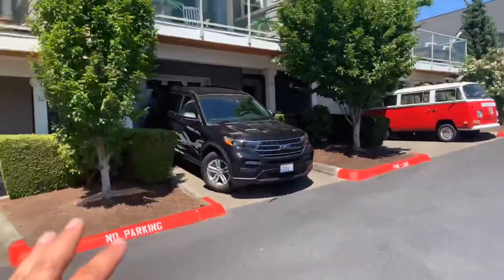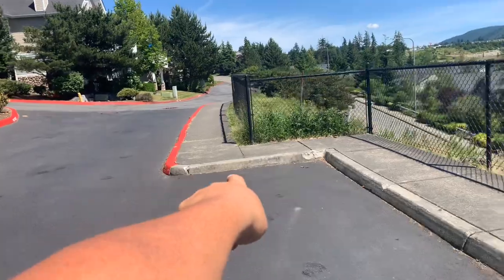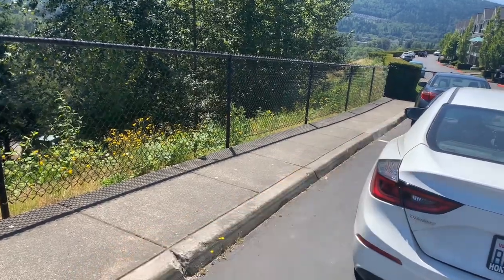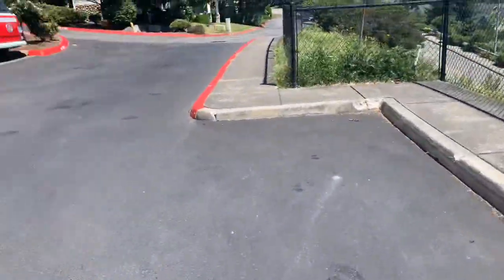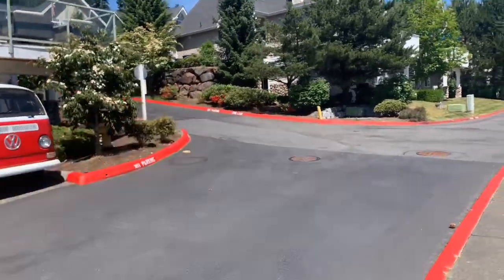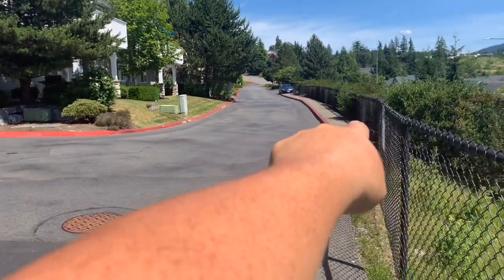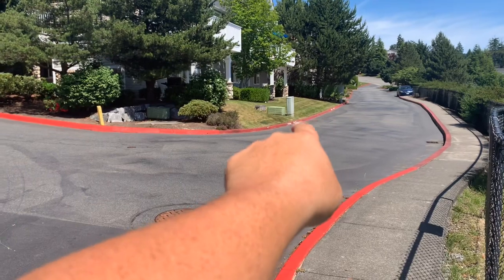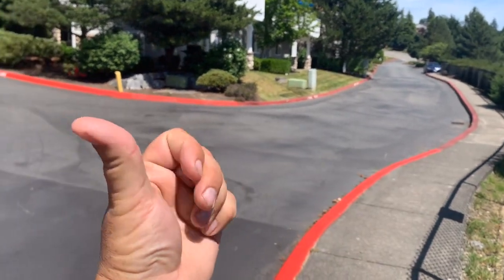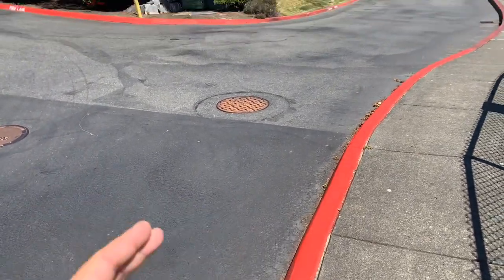Now I'm getting up to the intersection here by the T building. As you can see, I included the 40 feet from where the red stops all the way down to that joint, which means there'll be one piece of old curb sitting there in between. Okay, so 40 feet of curb. We've got the stop bar. It's 12 foot long. We've got this seal coat area, which I told you stops at the red, where the new red is, goes over to the joint. We've got a 15-mile-per-hour stencil that'll sit on this side of that seal coat line, so people will be able to see it when they're driving this way. And then right here across where it says drain and behind the sewer lid, we're going to put the other 15-mile-per-hour stencil so they can read it when they go this way.